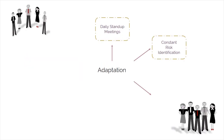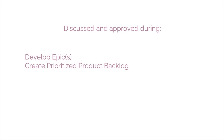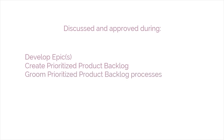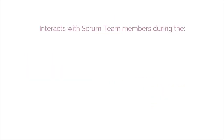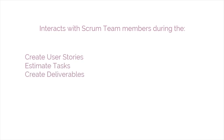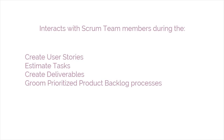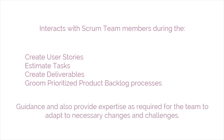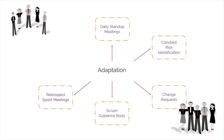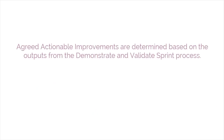Improvements can also result in Change Requests, which are discussed and approved during the Develop Epics, Create Prioritized Product Backlog, and Groom Prioritized Product Backlog processes. The Scrum Guidance Body interacts with Scrum team members during the Create User Stories, Estimate Tasks, Create Deliverables, and Groom Prioritized Product Backlog processes to offer guidance and provide expertise as required for the team to adapt to necessary changes and challenges. In the Retrospect Sprint process, agreed actionable improvements are determined based on the outputs from the Demonstrate and Validate Sprint process.